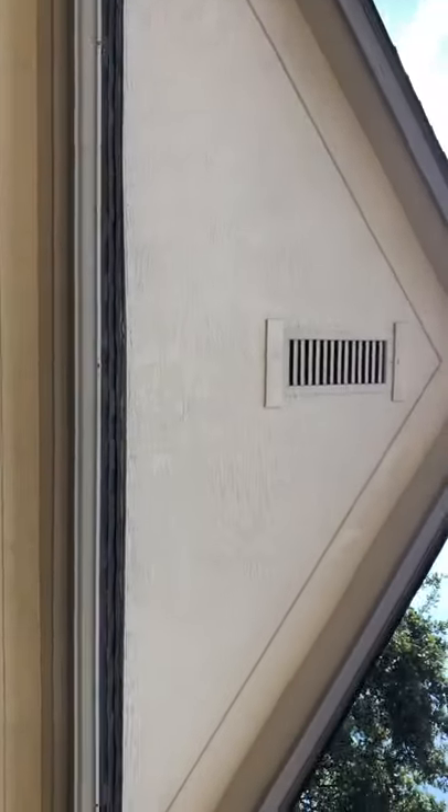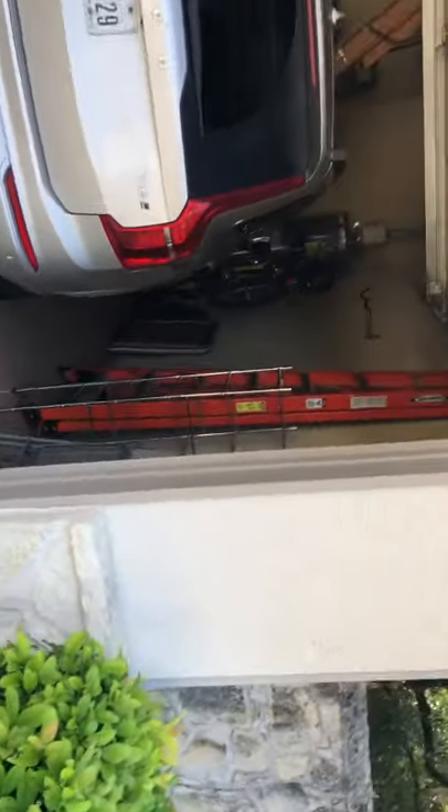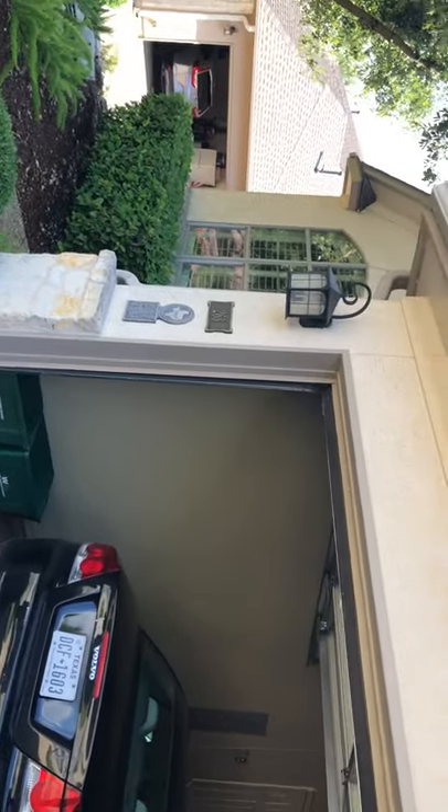On this side we've got a couple of gable tops. All three gable tops, including the one over the garage wall, will be painted including the vent. We'll also paint the facing here. We don't need to do anything with the garage door trim — I think that was recently painted on their last painting effort.